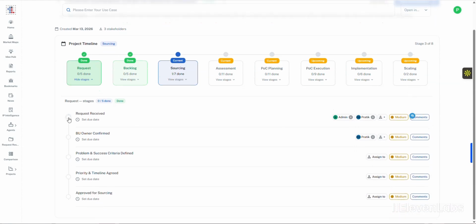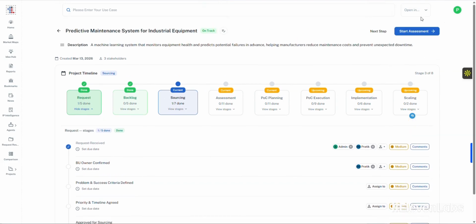Once each of these sub-stages have been closed, simply click on this section here to mark as closed. On top right is the button to move the project to the next stage of the process, as the previous stage gets highlighted in green and closed. Please do note that two stages can operate concurrently depending on the style of innovation projects that are run in your organization, as short cohort-based or on annual or long-term rolling basis.